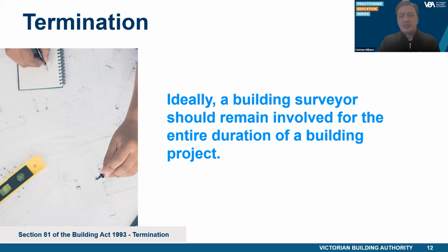Ideally, a building surveyor should remain involved for the entire duration of a building project. However, sometimes a property owner needs or wishes to change a building surveyor before a project has begun or it is complete. In accordance with Section 68 of the Building Act, property owners cannot terminate the appointment of a building surveyor without the consent of the VBA.